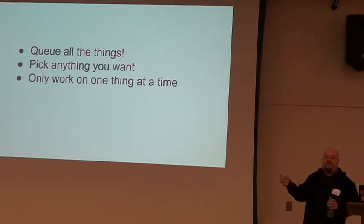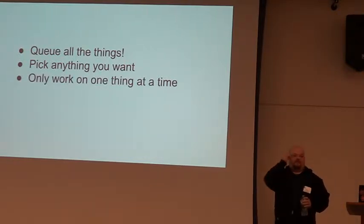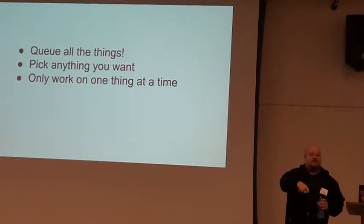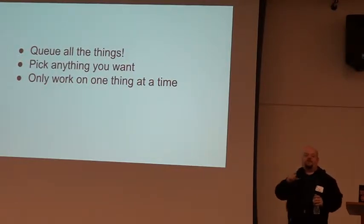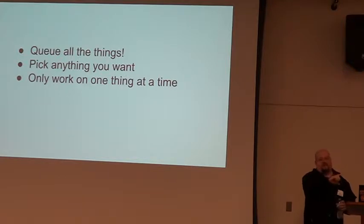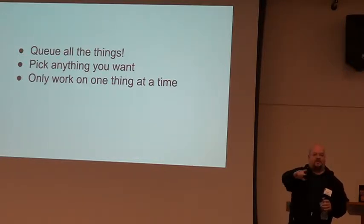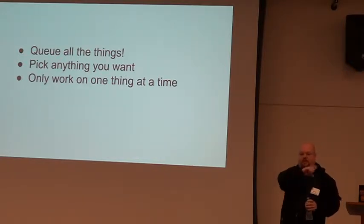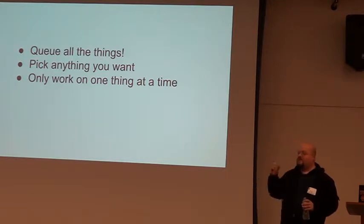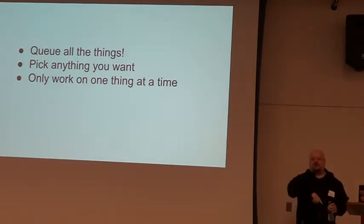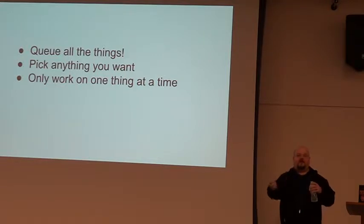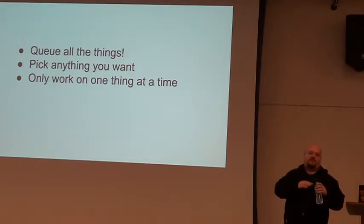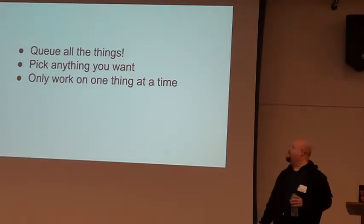The other thing, we talk about multitasking, you will work on your one card at a time. If your card is stuck, then we'll go figure something else out. But the idea is that you're going to shepherd this little card for as long as you own it, through whatever it needs to go through to get across the board. But you're only going to work on that one thing. Again, context switching and multitasking, you get hung up on this and then that. There's a lot of wasted time in the system like that.